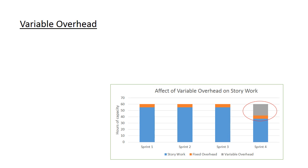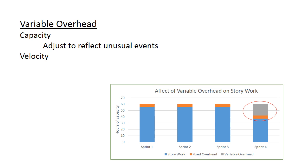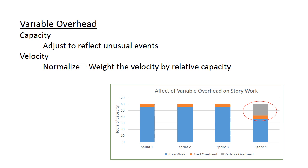What about variable overhead? You need to adjust your capacity for unusual events, deducting capacity hours for vacation and so on. The velocity can then be weighted by the relative capacity to show a more consistent view. You should not create stories to cover vacation, release planning, or to give credit for completing vacation, holidays, or all-hands meetings on your burndown. Similarly, you shouldn't get credit on your sprint burndown for holidays, vacations, or attending an all-hands meeting. So you shouldn't create tasks or stories for these variable overhead items.